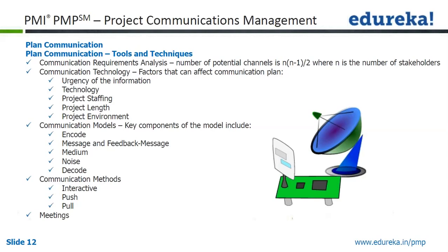Another form of communication is push communication. It depends on which kind of method you will use. When you are just disseminating some information, you will use push or pull kind of communication methods. But when you want immediate feedback, you want to ensure that it is a very important communication and everybody understood, you will prefer interactive.